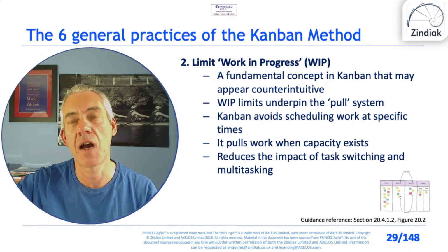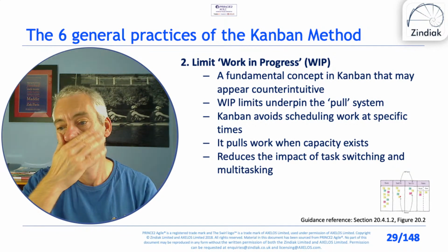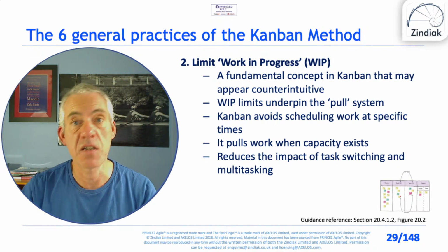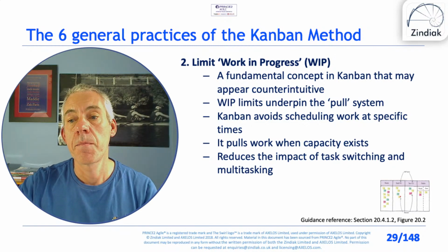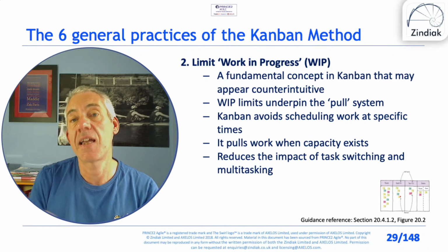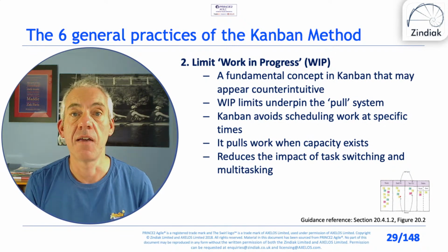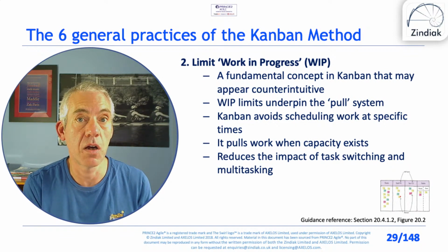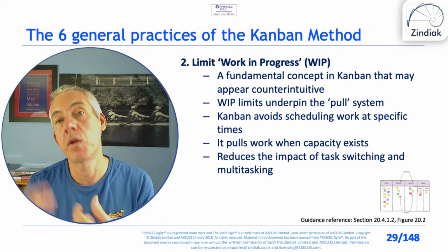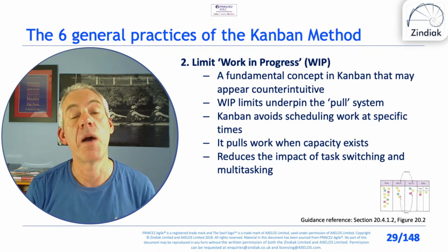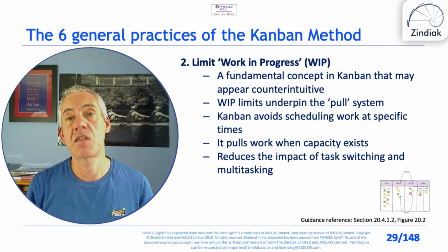And one of the things you might look at in a retrospective is if there's a piece of work that only one member of the team can complete, they're a specialist in a particular area. Do we just keep letting them do that area of work, or do we take the hit on a particular sprint to say we're going to get someone else to do it with their support? It will take longer, but going forward we'll then have two people, so we're losing that kind of single point of failure. Again, people need to feel safe in order to do that.